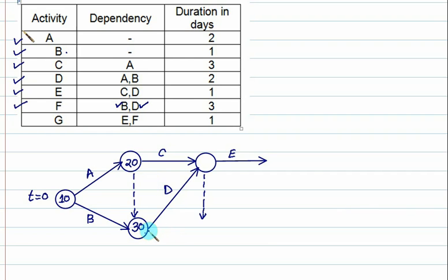So I will start from this one dummy activity, and this also requires 0 time. It means that B was finished, and if I go via this, D is finished. So I can start my next activity equals to F. Now for G, E and F must finish. It means that I will take this value somewhere here. I will take this F somewhere here.